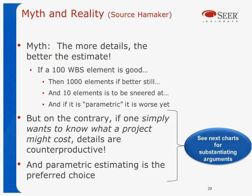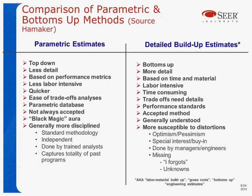Joe Hamaker, who at one time was head of cost at NASA and is now at Galerath, said there's a myth that more details means a better estimate — that if a 100-element work breakdown structure is good, then 1,000 must be better. On the contrary, if somebody wants to know the cost of a project, the details are counterproductive and parametric estimating is the preferred choice. Parametric estimates are top-down, quicker, have easier tradeoffs, and are more disciplined. Bottoms-up detailed estimates take more time, tradeoffs need details, and a lot of things can go wrong — people can be optimistic or pessimistic at the root level, and worst of all, they forget things that didn't end up in the work breakdown structure or treat everything as best-case in the bottoms-up estimate.